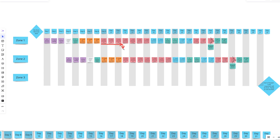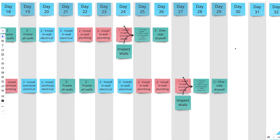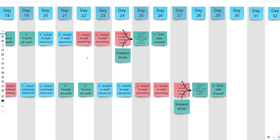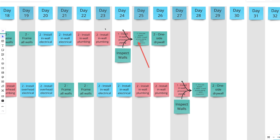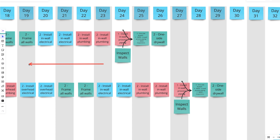In this pull plan we went forward first, so now we go back. For an activity like one-side drywall, take the first activity in sequence and have the trade come up with two needs. For example: in-wall process piping — yes, we have that; inspections — we didn't have that, so we add an 'inspect walls' sticky and check it yes. You keep going back, adding needs for each activity until the sequence is complete.